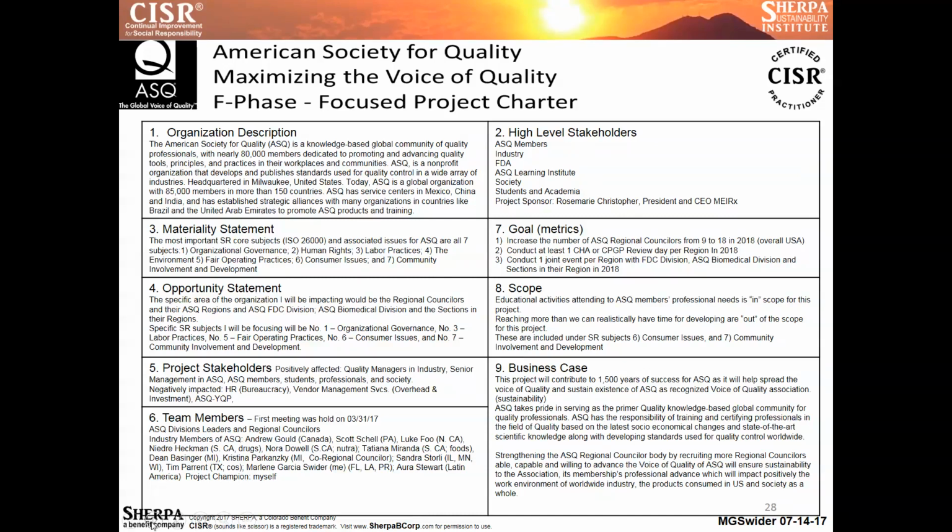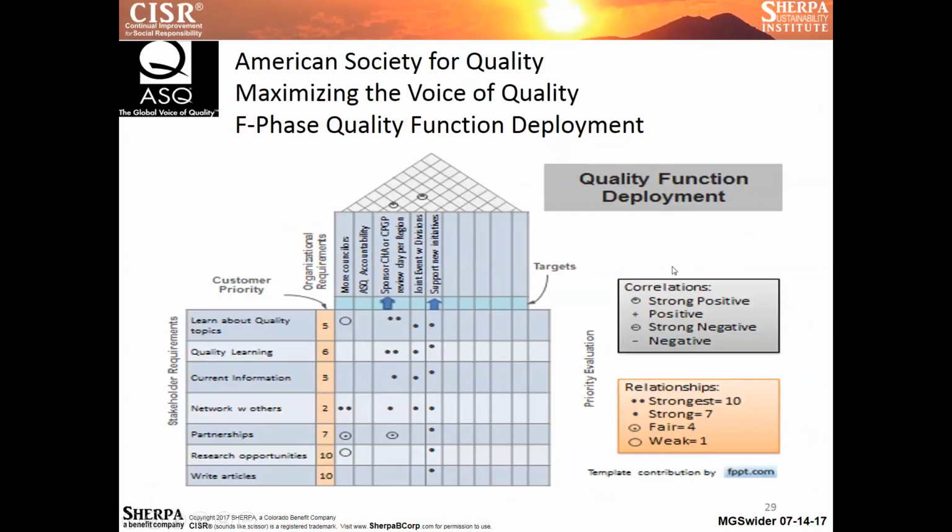I have to remind those who haven't done a project charter that usually a project charter is a living document. It keeps evolving as you keep finding things. Even though it has been approved, it's a good thing to keep it alive so you can keep adapting to changes. Another tool that is highly used in the F focus phase is the quality function deployment.